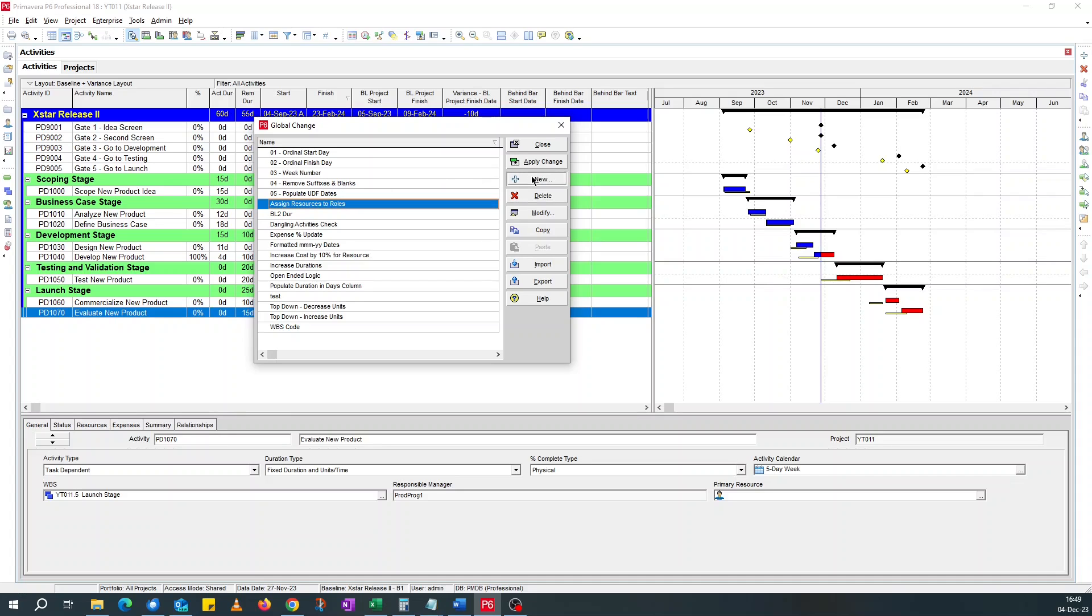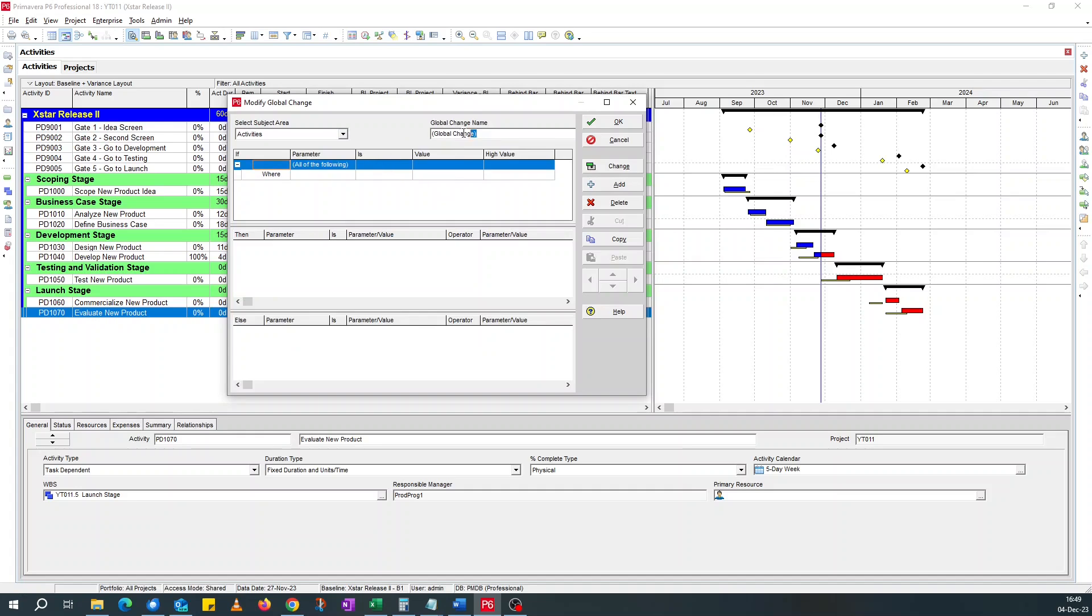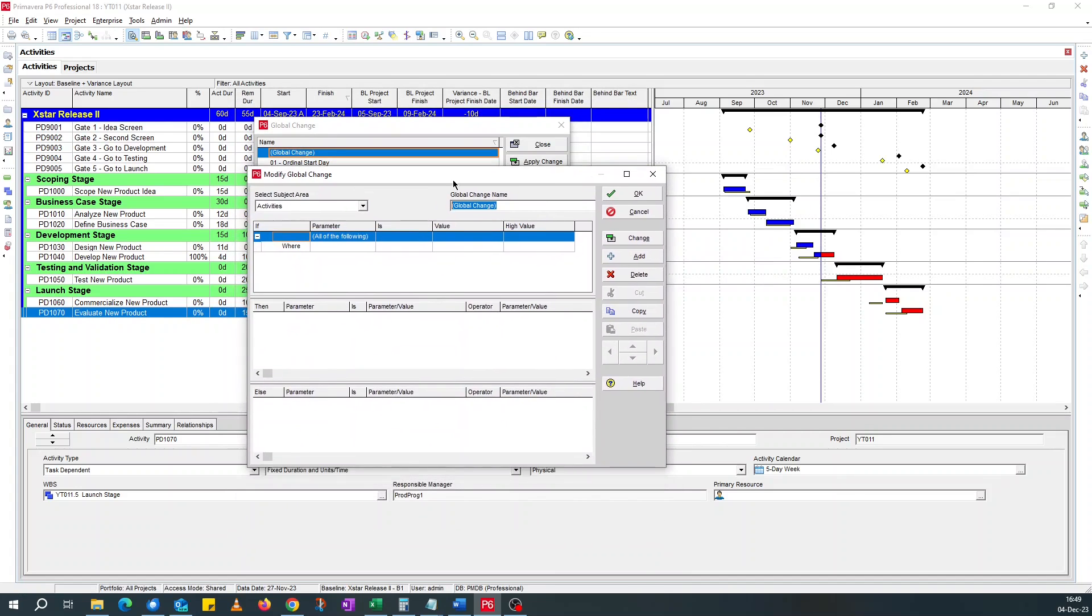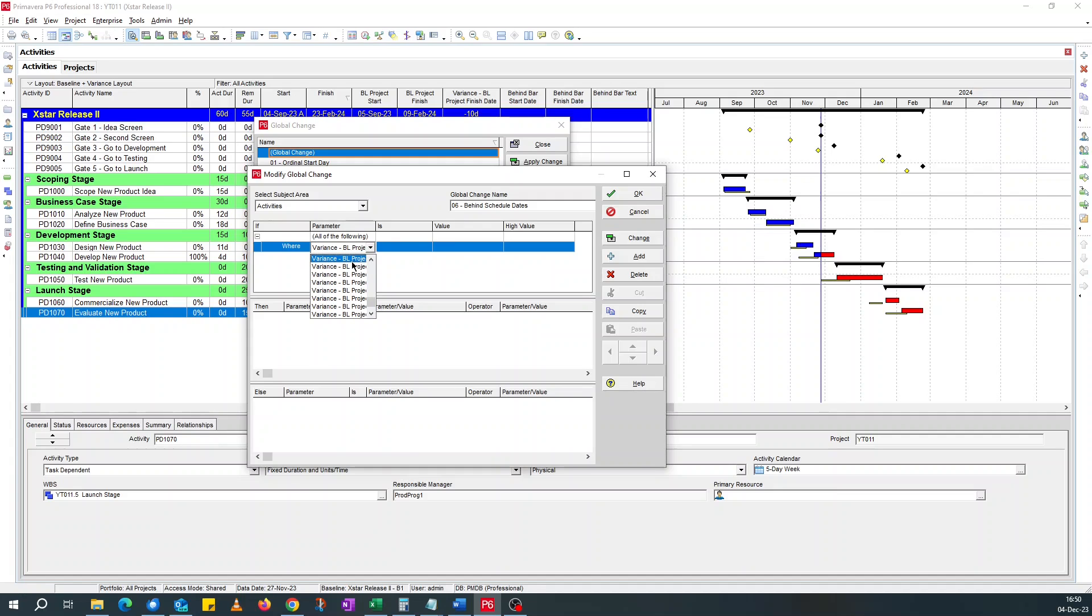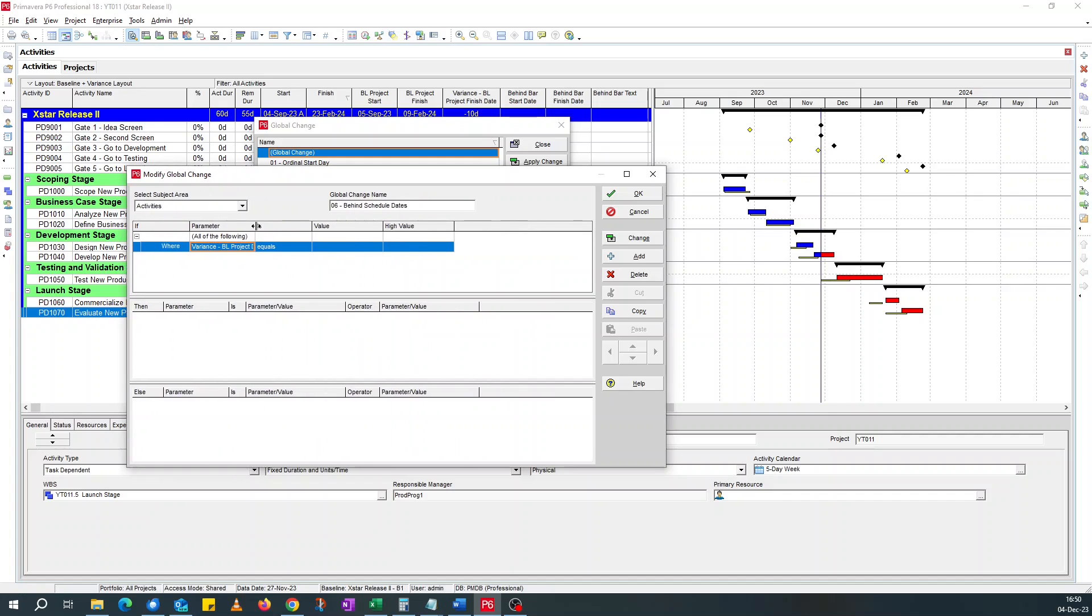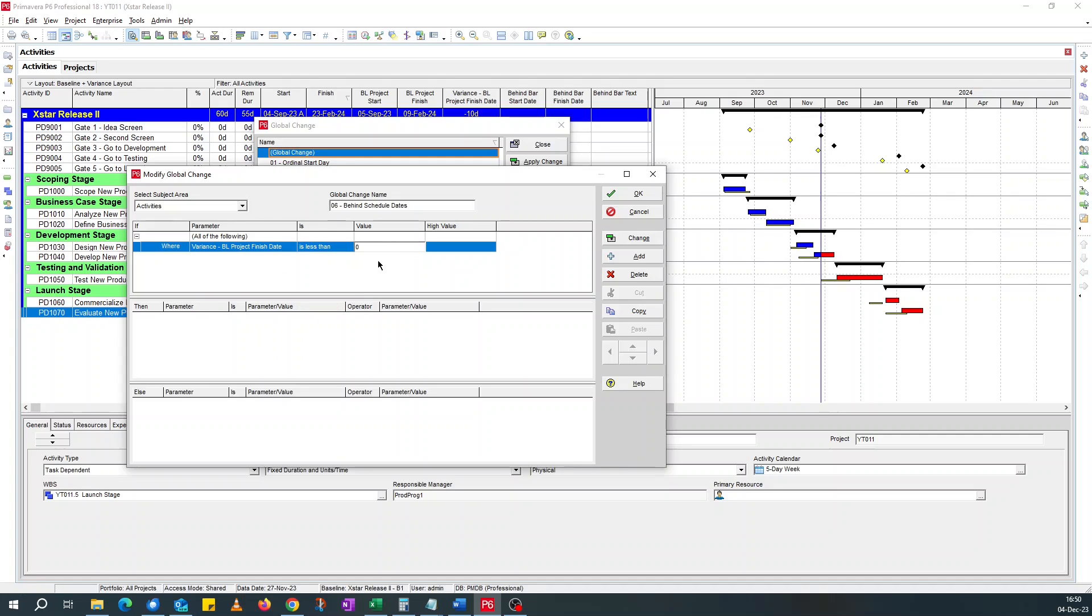If I click on new, I'll name this, the last one is five. So I'll say zero six behind shadow dates. So remember I said for activities that are behind have finish date variance of less than zero. So if we look for finish date variance is less than zero. That's the condition. That's the if statement.